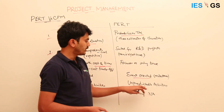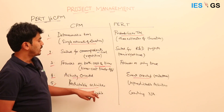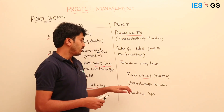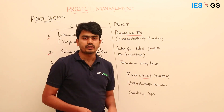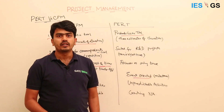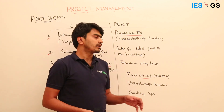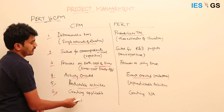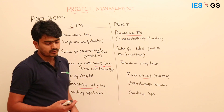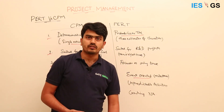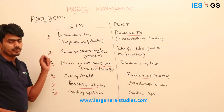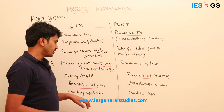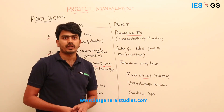The sixth difference is the applicability of the crashing technique. Crashing is not applicable in PERT because we don't try to force a reduction in project duration by assigning more resources — adding resources may not solve an R&D project problem. However, in CPM-based projects like construction, you can crash a specific activity by assigning more manpower to speed it up and reduce the overall project duration.